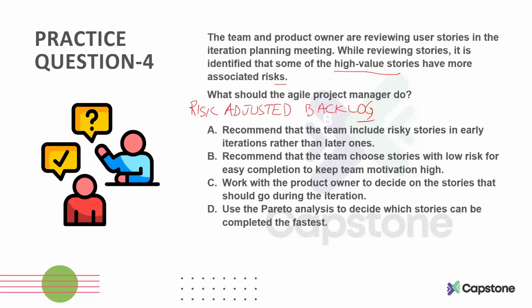So it is always recommended in Agile that you plan such user stories early into your iterations rather than moving them backward into your project plans.